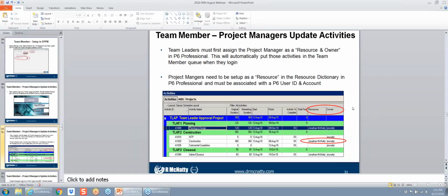All right, so it's two parts. The resource column, I cannot use fill down. But what I can do is if I click in the resource column, I get that window that comes up in P6, and then I can use Shift and go down to the very bottom and then hit the green plus button, and that will drop everything in the resource column for me.